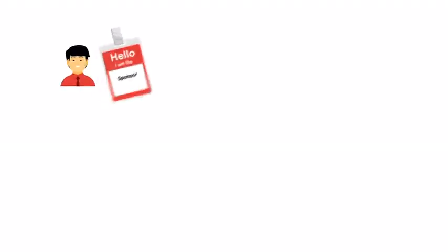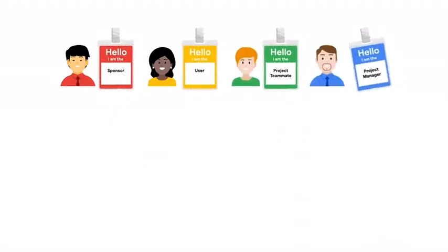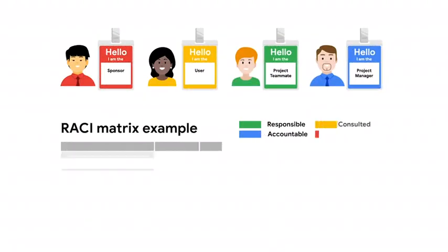So, who's invited to the kickoff meeting? Well, that would be the team members identified in a RACI chart created during the initiation phase. As a reminder, a RACI chart helps to define roles and responsibilities for individuals or teams to ensure that the work gets done efficiently. During the kickoff meeting, team members will learn more about how they'll contribute to the project and gain a deeper understanding of how the team will work together to reach the project's goals.